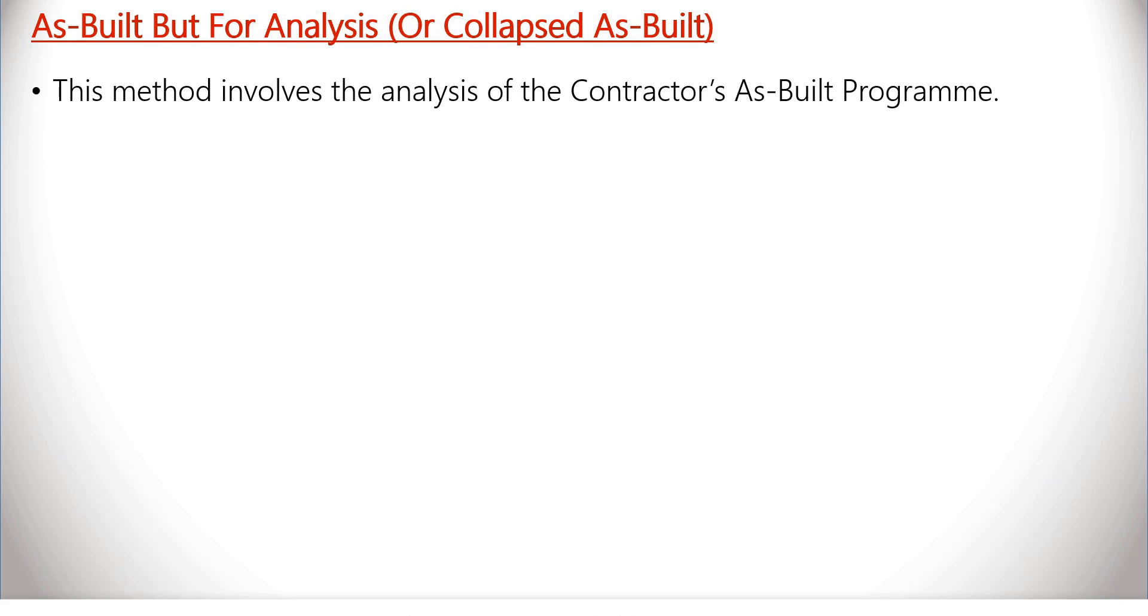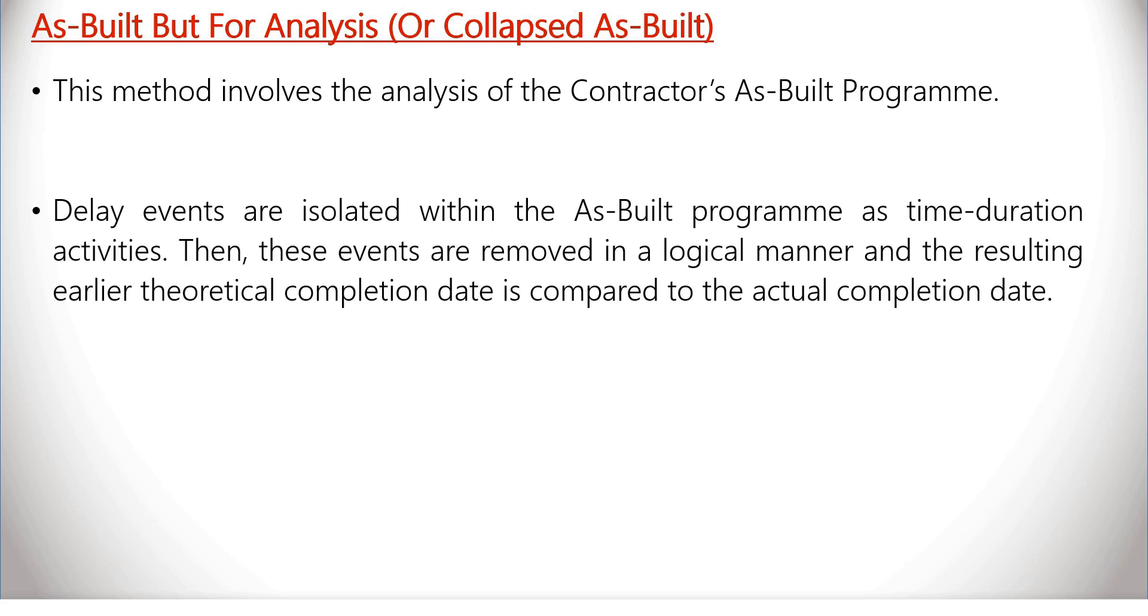Delay events are isolated within the as-built program as time-duration activities. Then, these events are removed in a logical manner and the resulting earlier theoretical completion date is compared to the actual completion date.